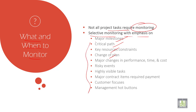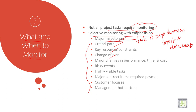First, what is a milestone? A project milestone is a task of zero duration. It shows important achievements in a project. The milestones should represent a clear sequence of events that incrementally build up until your project is complete. So milestones help to give a clear sequence of events to complete the project.